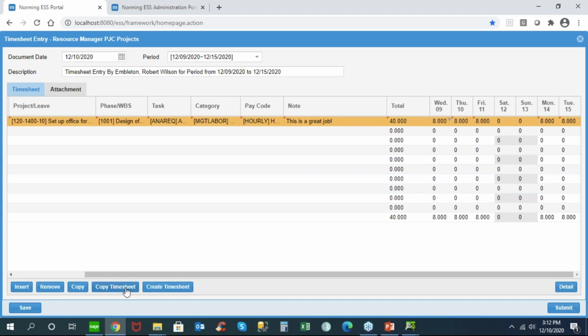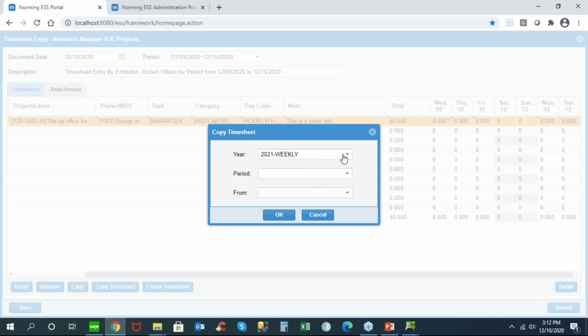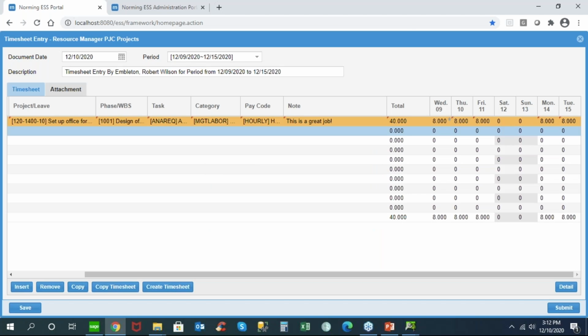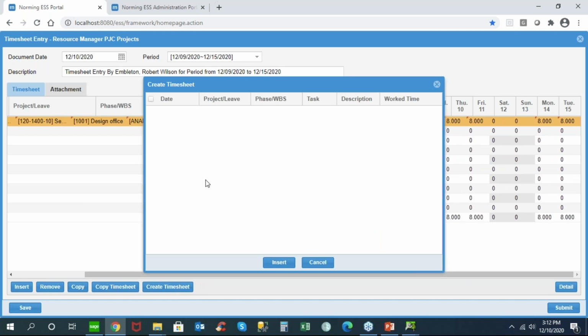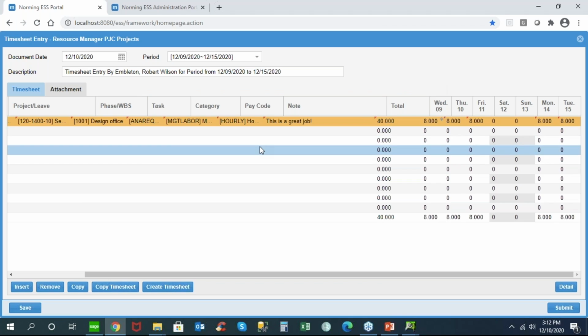Notice as well that we could copy a timesheet from a previous period, and if I'm doing the same job week after week, that would streamline the data entry for me. If we use our resource planning, we're assigning resources or people to projects and jobs, we could use the resource planning calendar to generate my worksheet because it would know in advance which jobs I was supposed to work on, and then I would just edit that for what actually took place.